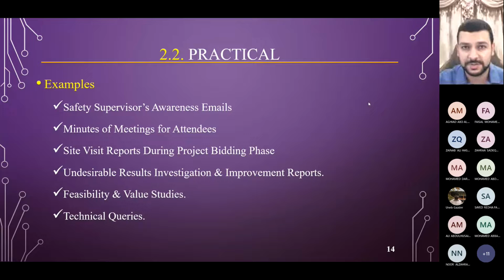We gather those NCRs, for instance, we speak about them, we issue lessons learned, and what are the lessons learned from those issues. For instance, one of our friends, he just forgot to add a box, for instance, to block out some concrete. And the major cause was, after we poured and we had the steel, we had to bring machines and jackhammers to just break this blockage area, which took labor's man hours times rental, for instance, if we don't have the machines. Then it takes machine hours, rental hours, money. There are consequences. So in order to understand those issues, we investigate and we report to our client or to our bosses regarding an improvement or a way or an alternative to those items.